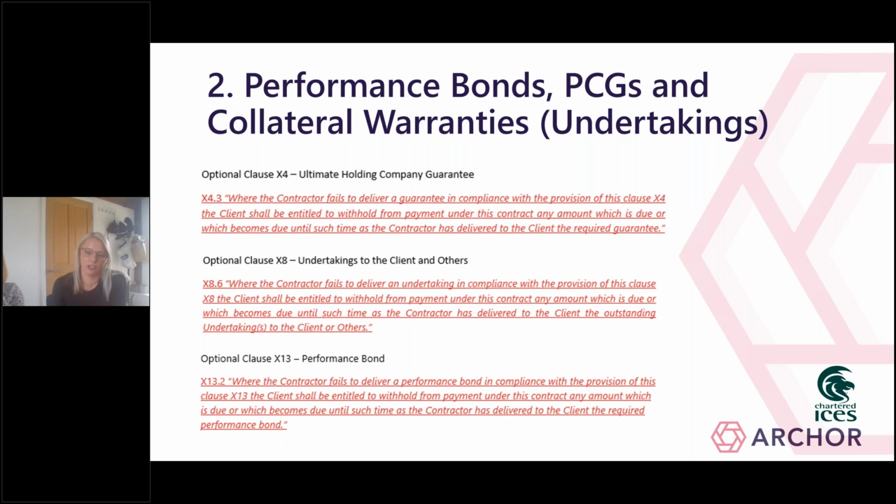Where the amendment to X8 shown on the slide is made, the contractor may not be entitled to any further payment where they haven't provided a collateral warranty on behalf of a subcontractor. So this is an amendment that can have some very significant commercial implications.